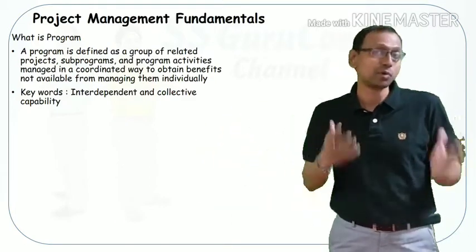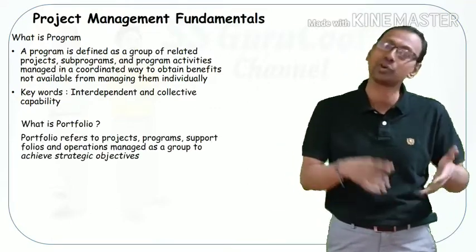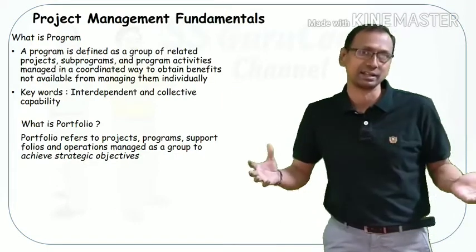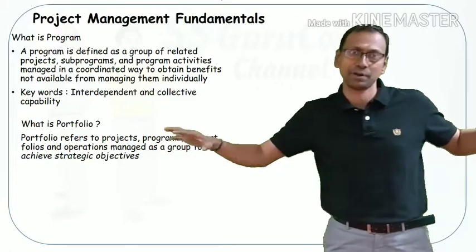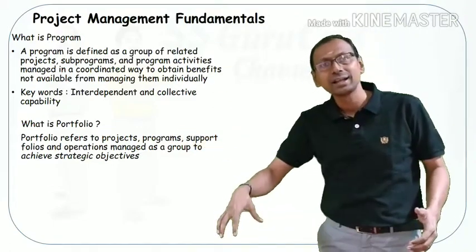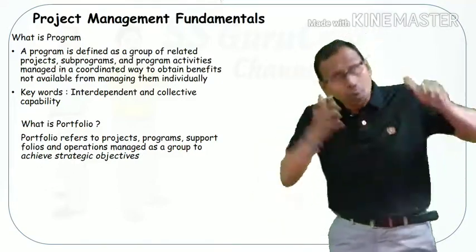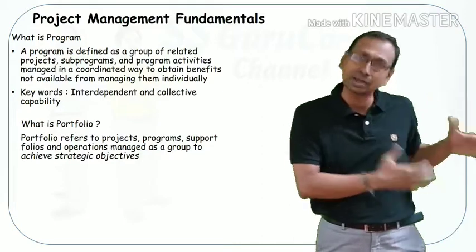Now what is a portfolio? A portfolio is a collection of projects, programs, sub-portfolios and operations managed towards a strategic objective. Let us take a power plant. The power plant has a water treatment plant and a thermal power plant. All thermal related projects and programs can be managed under one portfolio. All water related programs and operations can be managed under another portfolio.